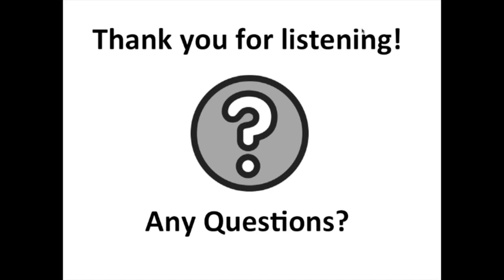That's a very good question. It could be a bit of both, actually, because clearly any meeting you have relating to the project should be recorded somehow in the log, I would say, because that's what the project is all about, advocating for something. So if it's related to that. But it could be smaller things as well, like a newspaper article is published on a day that's relevant, that seems to fit with the arguments you're presenting. So put it down, because even though it's not something you've done, it's a kind of contextual thing that A, will help you remember it's there anyway, but B, it helps you create a narrative of how things are developing at a certain time in the context.